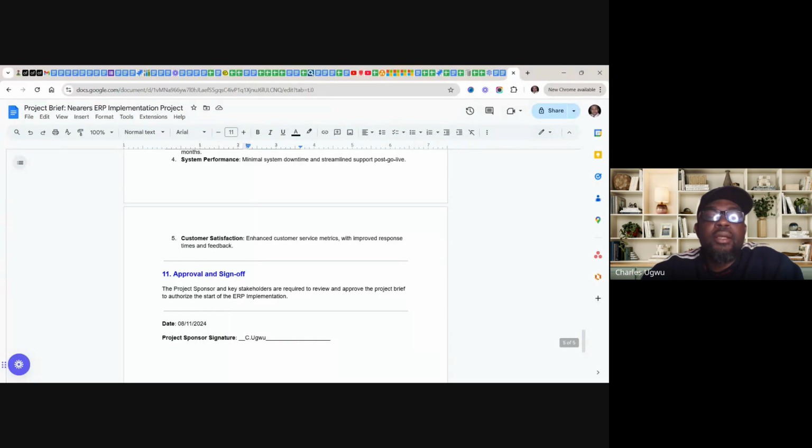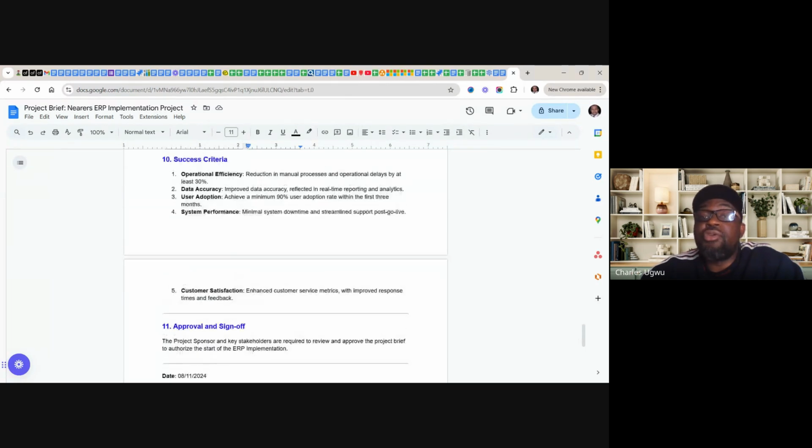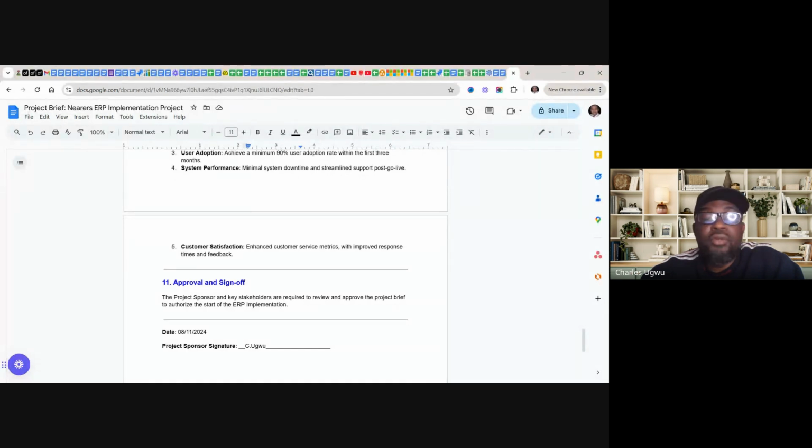Okay. And then approval and sign off. The project sponsor and key stakeholders are required to review and approve this project brief to authorize the start of the ERP. Today is 8th of November, 2024, and the project sponsor's signature is already appended on this, showing that this is already a working document for this project.